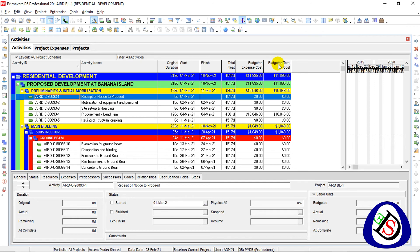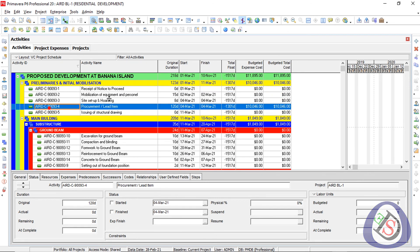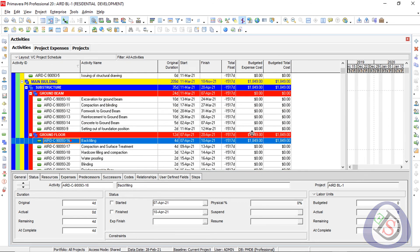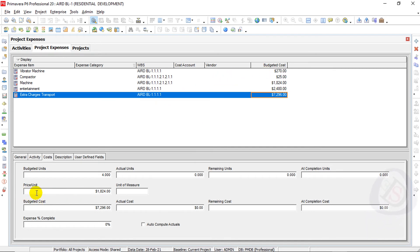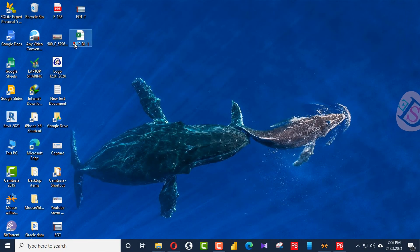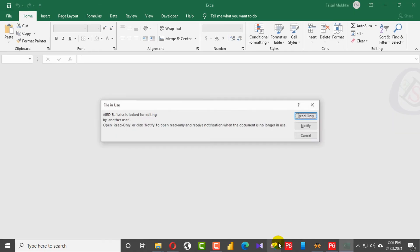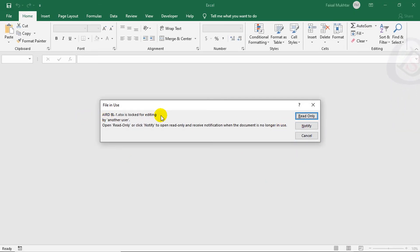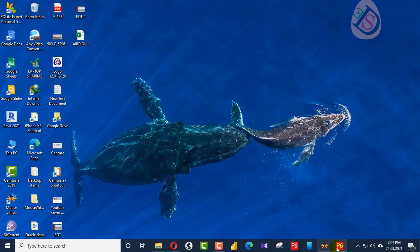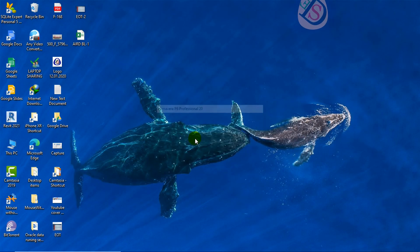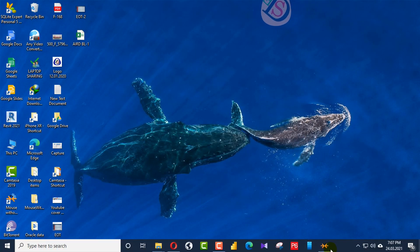I can now see the total project cost in the Activities view. The two activities — Activity 4 and Activity 16 — show the assigned cost. The Price Per Unit and total cost match what was entered in the Excel sheet. I open the actual sheet to verify, but the file appears locked, so I close and reopen the database and project.